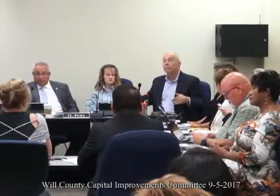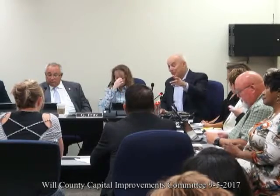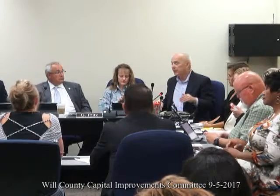Well, I'm going to talk about the budget now. You're absolutely right. When we did the construction budget, we left things out because we wanted to make sure we could drive to the budget that we set forth. Dave, we said, okay, we'll take certain things and not include them, signage being one of them. And there were some other items in there: landscaping, furniture, a number of other things.